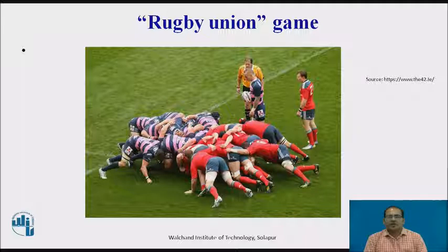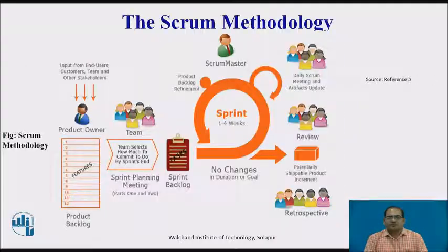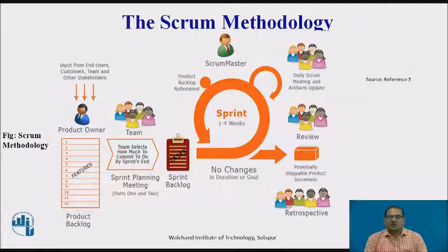Scrum believes in empowering the development team and advocates working in small teams of say 7 to 9 members. Scrum is an agile development framework that includes the same types of activities as the waterfall methodology, but rather than implementing them as sequential phases, they are encapsulated into multiple iterations or sprints to create a working application. Scrum builds the application incrementally, with each increment adding and improving the features and functionality created by its predecessor. The different types of Scrum methodology will be explained in detail in the next video.